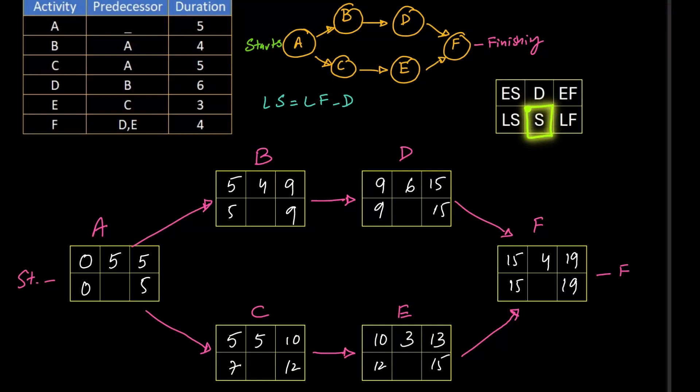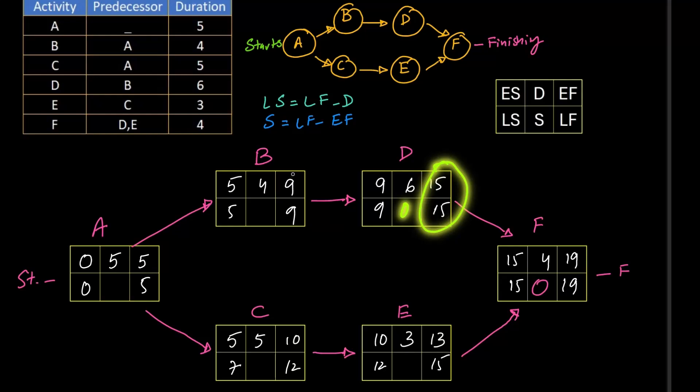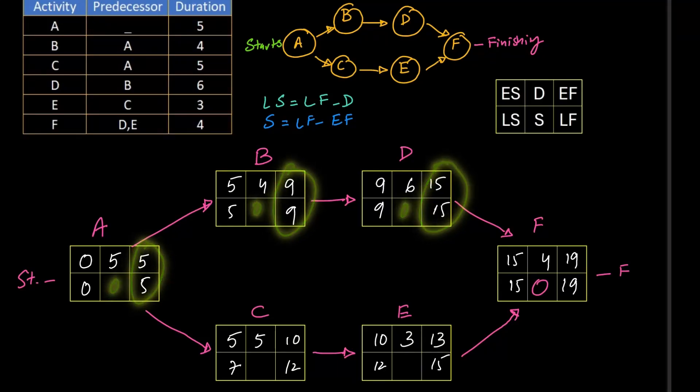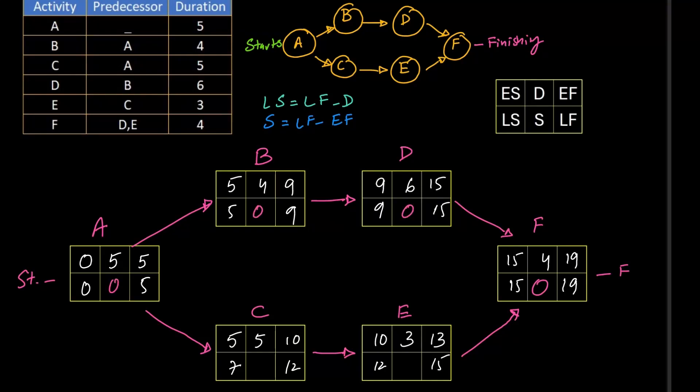Now we have left a very important box, which is this one, the slack box. If there is a presence of slack in an activity, that will mean that activity can be delayed. And slack's formula is S equals to LF minus EF. So these are the two boxes that are in action for slack. LF minus EF will give us slack for the particular activity. 19 minus 19 equals 0. 15 minus 15 equals 0. 9 minus 9 equals 0. 5 minus 5 equals 0. So we can put zeros in A, B and D. On the other hand, E has 15 minus 13, so the slack will be 2. Similarly, C has 12 minus 10, the slack will be 2 again.